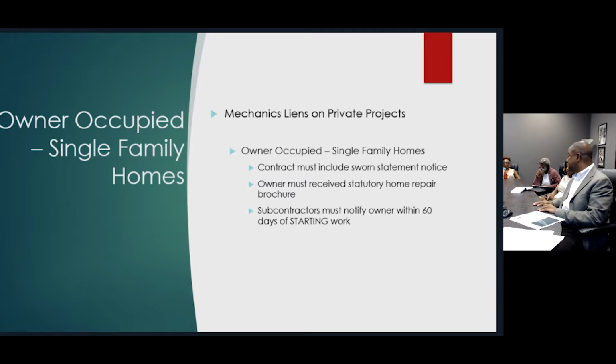And if you have PIN numbers, you can go online to the assessor's office and find out if liens have been placed on properties, and find out how many people there are on the lien. You can also go on to the Recorder of Deeds website, and if folks have recorded their lien, that will be on the recorder site as well. Okay.